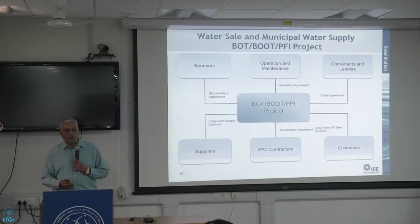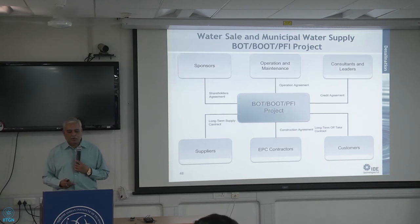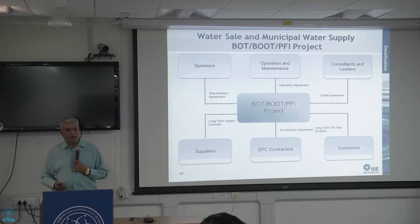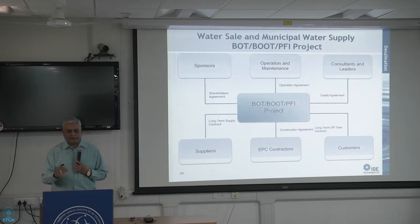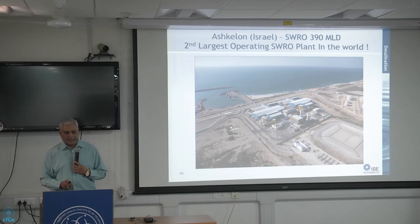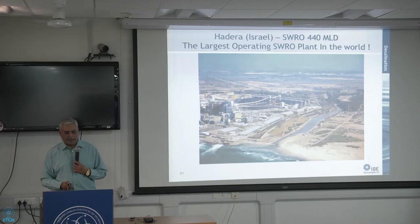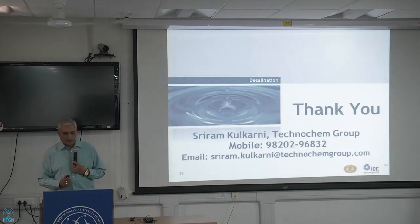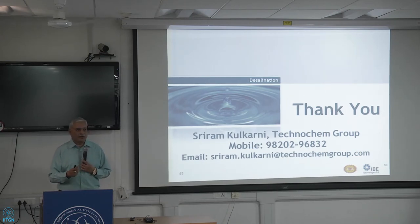There is now a move toward water sale and municipal supply in the form of build-operate-own projects. In a BOO project structure, there are multiple players: sponsors providing financing, suppliers providing equipment, EPC contractors executing the project, customers with off-take agreements, consultants, lenders, and operations and maintenance entities. Examples include: a 65 MLD SWRO project in Larnaca, a 390 MLD project in Ashkelon Israel, 440 MLD in Hadera Israel, and 550 MLD in Sorek Israel. Thank you for the opportunity — I am happy to address any questions at a convenient time.